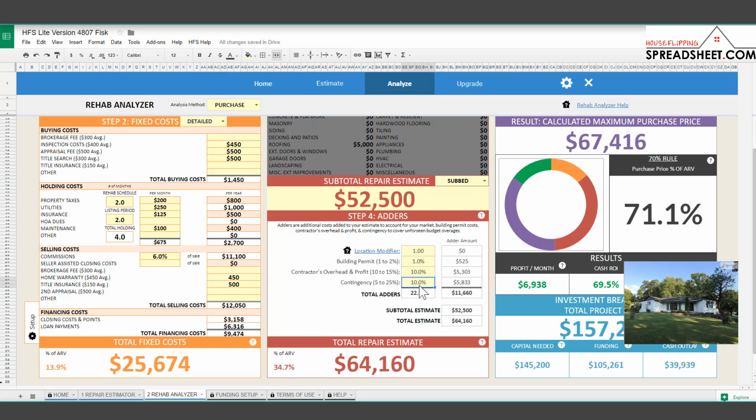Once you've figured out the scope of work and feel comfortable with the scope, you might be able to reduce that contingency down. But I would say 5 to 10% is pretty typical. If you do not feel comfortable with the scope of work, haven't walked the property, maybe you're uncomfortable with estimating or don't have a lot of construction experience or flipping experience, this is really something where you should get real contractors involved, get real pricing from contractors and subcontractors.